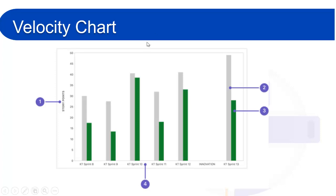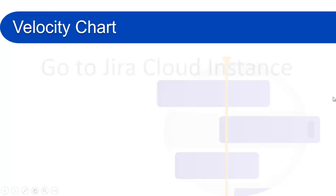You can also see a green bar. The green bar in each sprint shows the total completed estimates when the sprint ends. For example, if your team completed five stories containing 10 story points, the green bar will show 10 points. The key difference is that any scope changes made after the sprint is started are included in the green bar total, whereas they are not included in the gray bar.